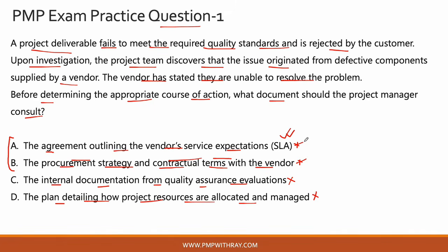You have defined the what with your procurement strategy and your contractual terms, and now you are defining the how: how will the contractor deliver it. For example, after a scope communication has been provided to the contractor, within 5 days they need to respond back. Let's say if a delivery order is placed, within 14 working days the delivery needs to happen.